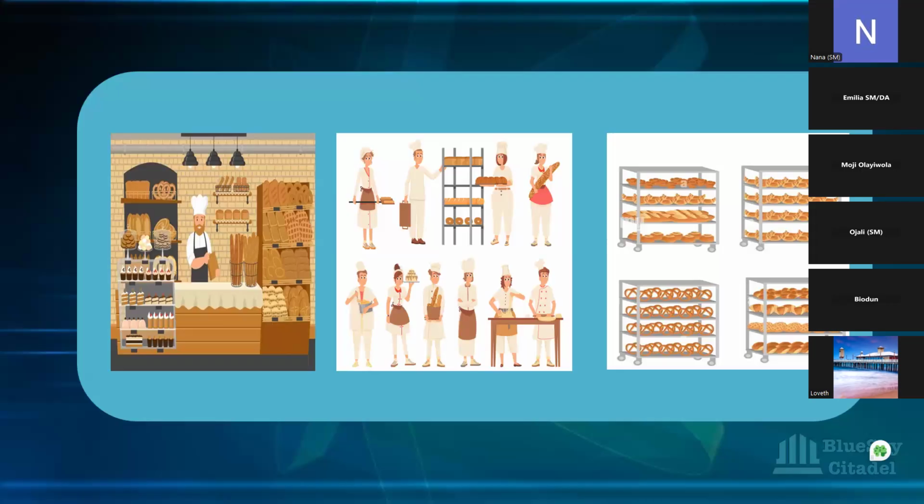And then by the time they are telling you, oh, we'll need the security team to help us to do this, we'll need the infrastructure team to do that in order for everything to work well and all that. You need the capacity. As an ADM, you need to know the capacity of those people so that you're coming back, and then you'll see where the word realistic is coming in. You're coming back to say, if we need these people during this 2 weeks cadence of sprints that we have, we might not get anybody because those teams that you're talking about, they are full on. They have just 3 people working because all the others are on holiday. I've gone to them and they're saying, oh, there is no way we can give you somebody to work with, or they might be able to give you somebody to work with. And that helps you to know how to plan your work.